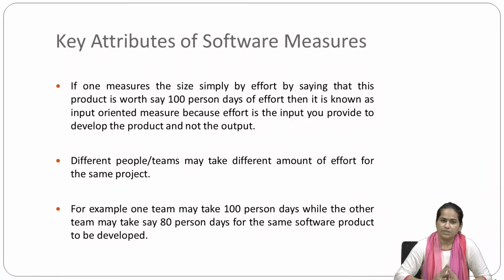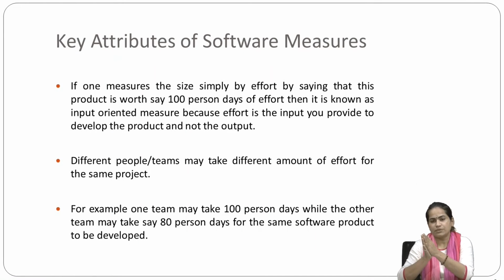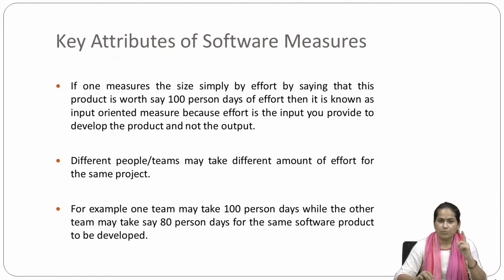If one measures the size simply by effort, by saying that this product is worth, say, 100 days of effort, then it is known as an input oriented measure, because the effort here is the input you provide to the development of the software product, and as we are not measuring the output product, we can consider it an input oriented measure.